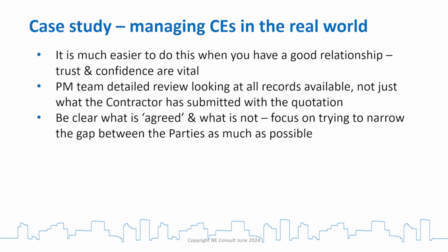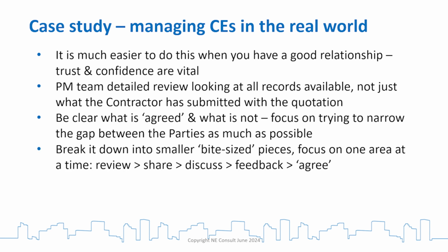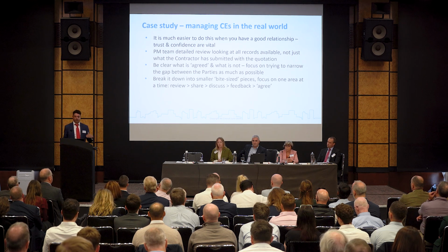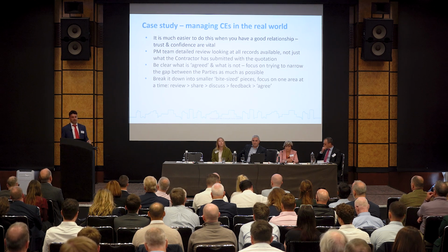That's what I suspect has happened. The other thing here is to be clear about what's agreed and what's not. I can't tackle £5 million in one go. Break it down into smaller bite-sized chunks. Okay? And when you've agreed it, it's agreed. As soon as you start unagreeing it, changing your mind and shifting position later, chaos. The trust and confidence disappears.